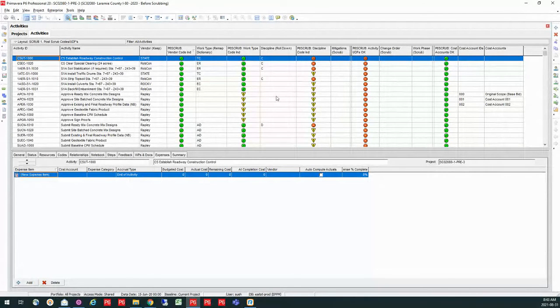This flag can be really helpful if there's codes that you need to use for reporting, right? So this flags it right away and helps you see right away that they haven't coded stuff that you need. Okay, so that's important when you've got consistent reporting you're trying to achieve across the portfolio. Absolutely.